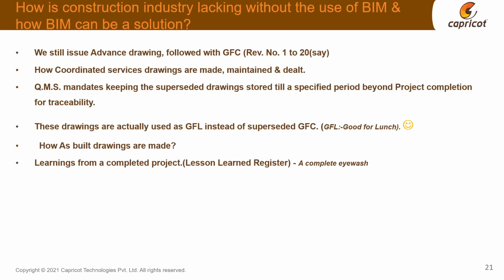Now next, let's talk about the as-built drawings. My experience of working in top Indian real estate companies has been, rarely do we make the as-built drawings in word and deed as truly as the as-built drawing should be made. What we do, we simply replicate the final version of the GFC, the soft copy. We change the title of the drawing to look like the as-built drawing, and voila, the contractor is eligible to get the completion certificate, and he is eligible to get every final payment released.